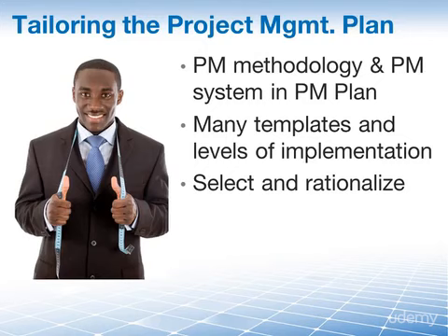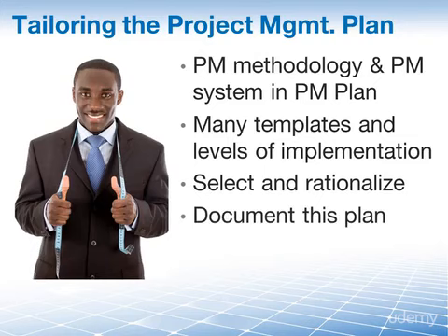So, in my example, we used tools to record our time and attendance. In the project management plan, we defined which parts of this tool were to be used and how they were going to be used on our specific project. We pick and choose parts, the processes, the levels of implementation, and techniques that are best suited for the project. We document this finally in our project management plan, and of course this tailoring takes expertise.